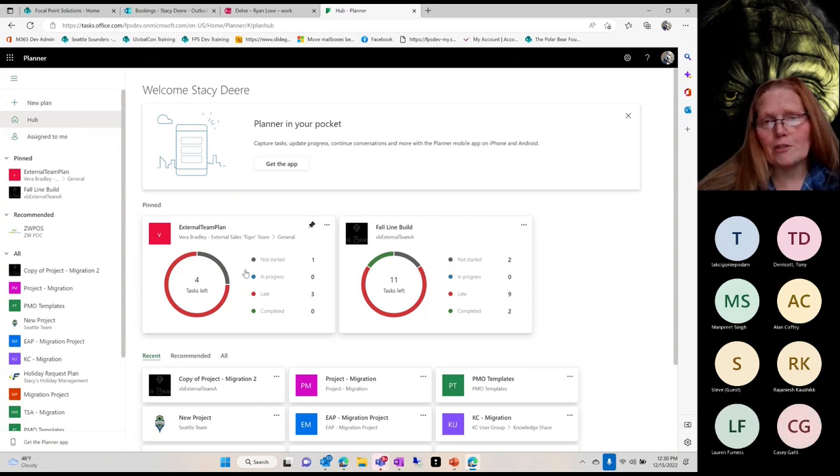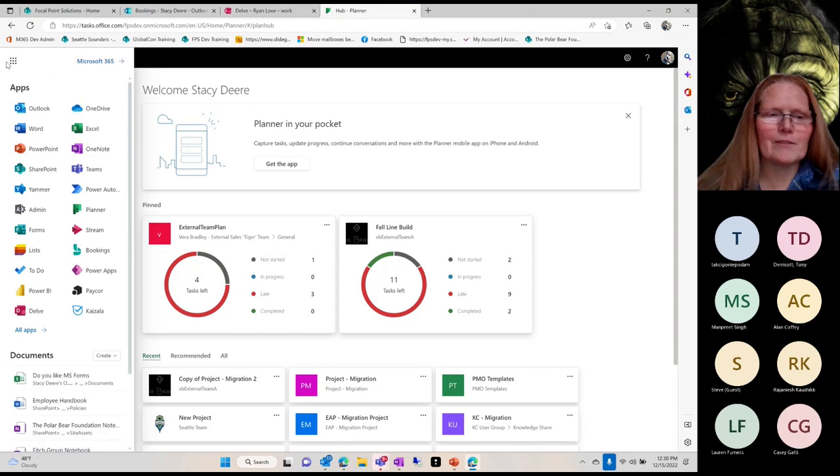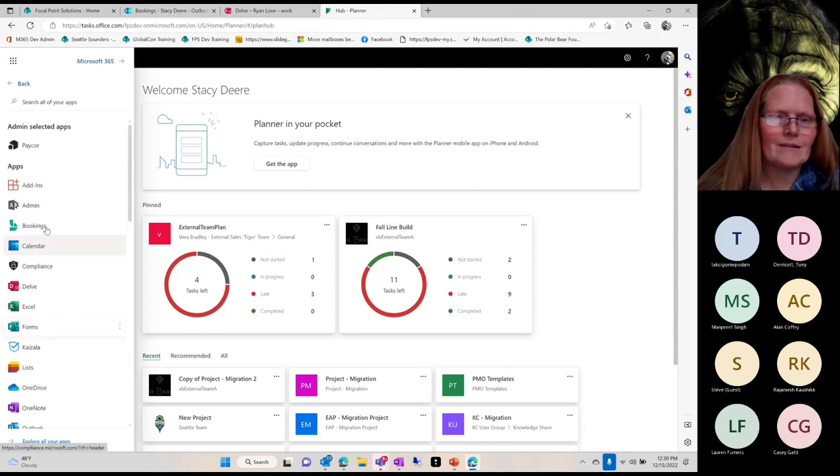What you can do is integrate Power Platform into this by connecting this using Power Automate and bringing all your tasks into a SharePoint list, right? So you bring those all in there. And then from the list, of course, you can use Power BI and create dashboards for your PMO site and stuff like that. So that you essentially get a view of all of your tasks and everything at a high level and a very visual representation. Okay. Like I said, everything integrates with something.